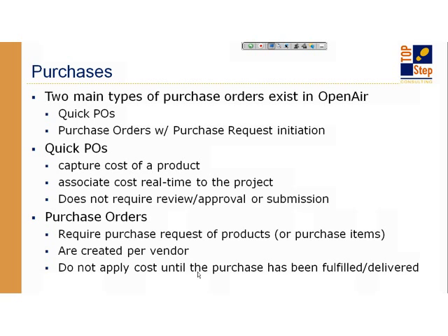Purchase orders, however, are more involved. They're usually where you have to get approval for a larger amount of funding perhaps, and maybe it's a subcontractor that you'll be giving a customer PO to, which is basically a vendor PO for you. And as they work it and invoice you, then you draw down against that vendor PO.